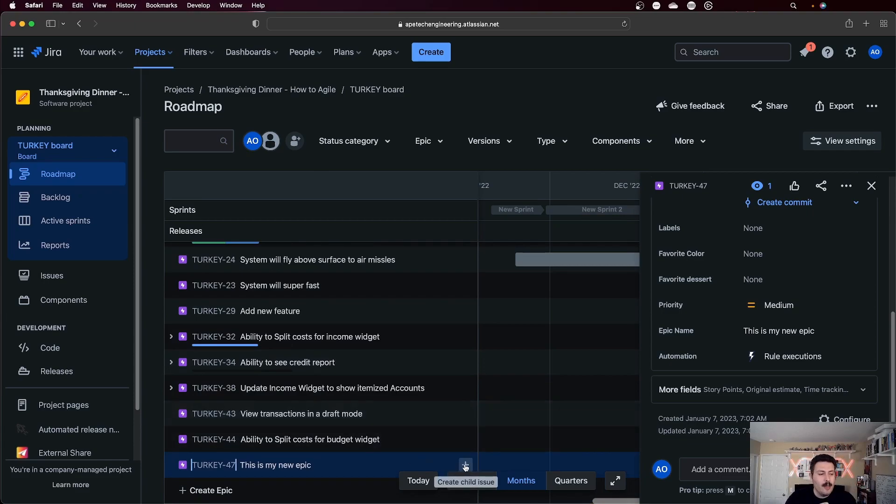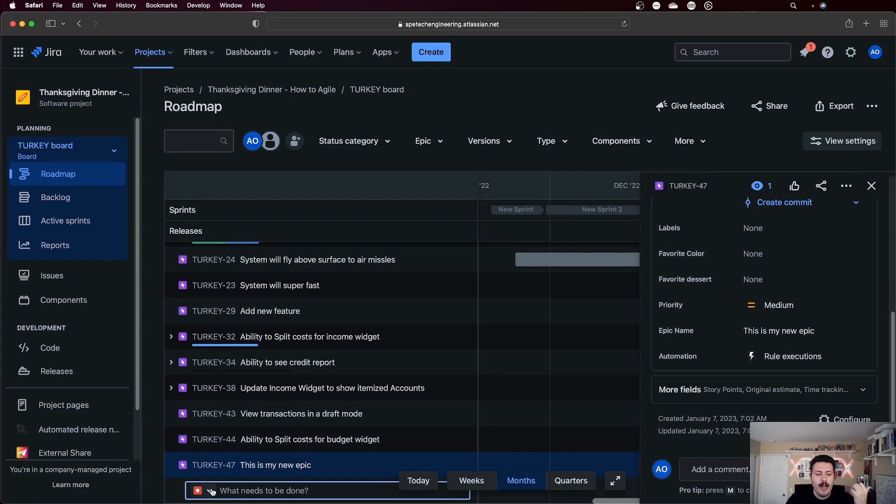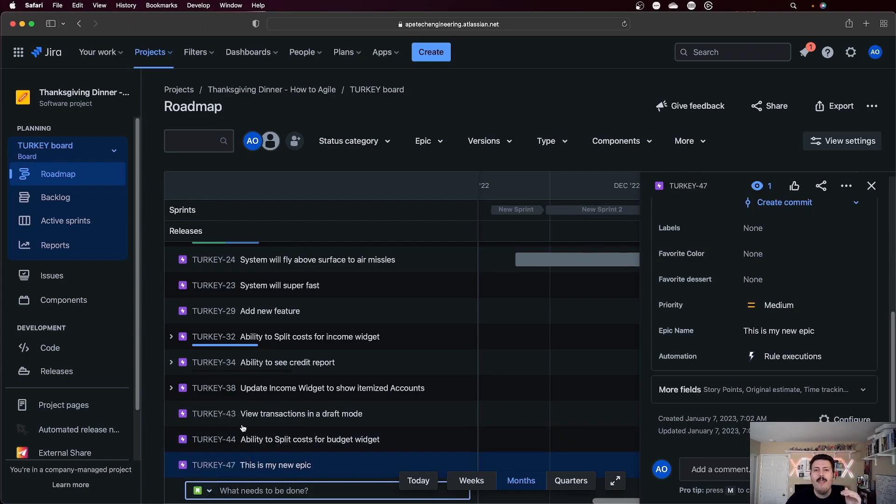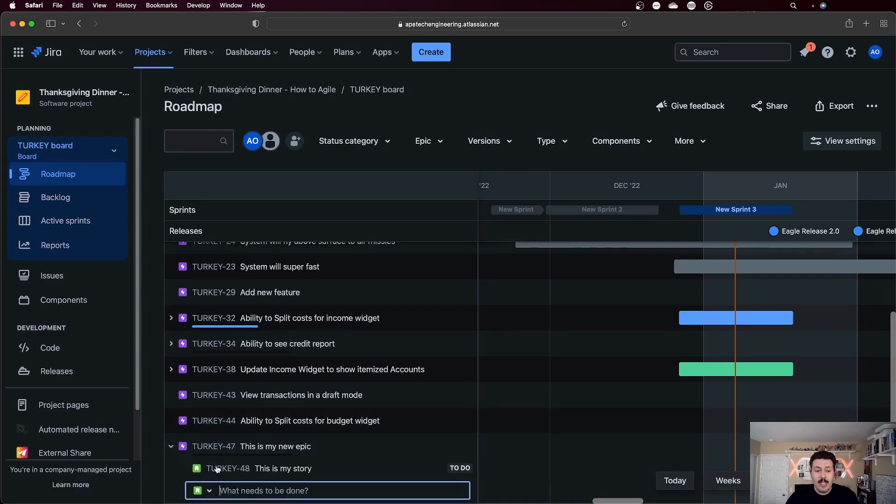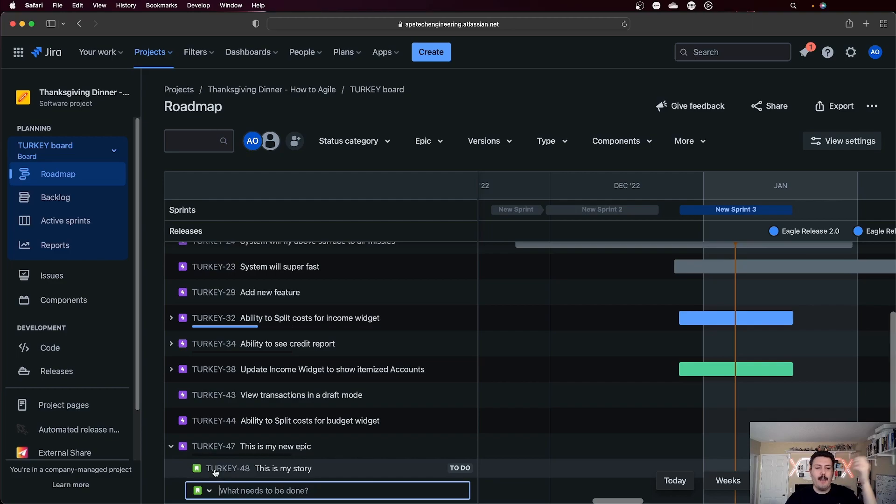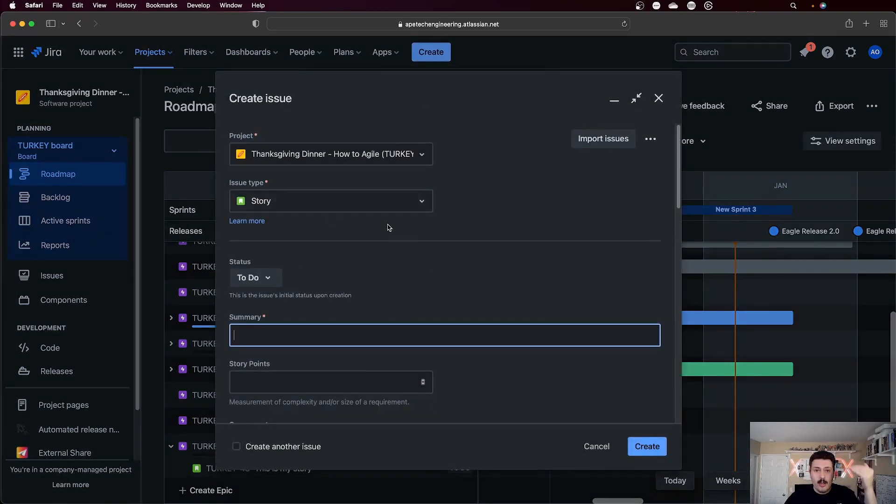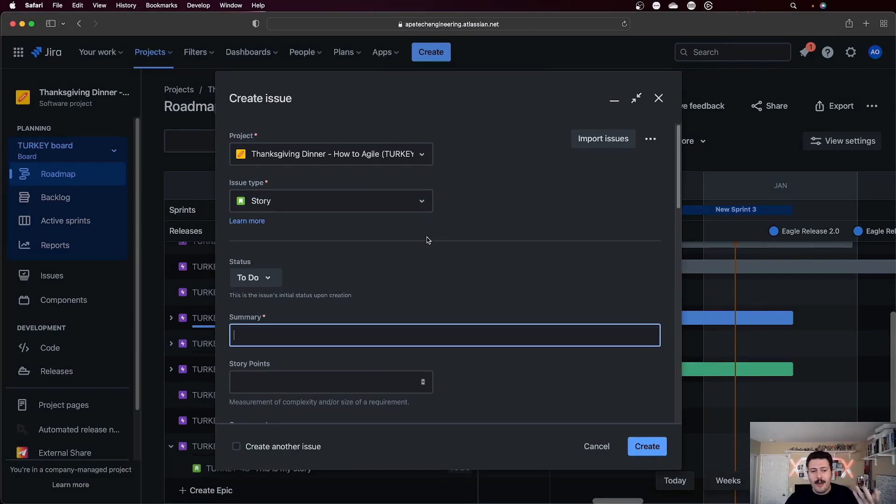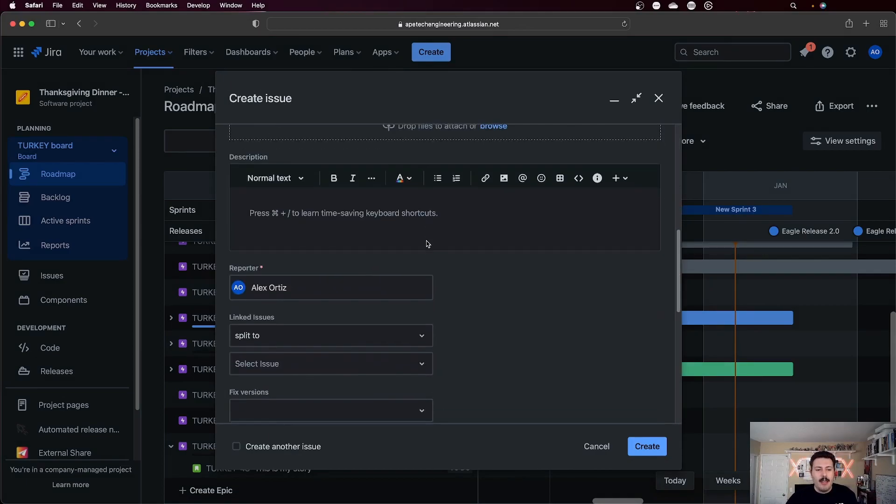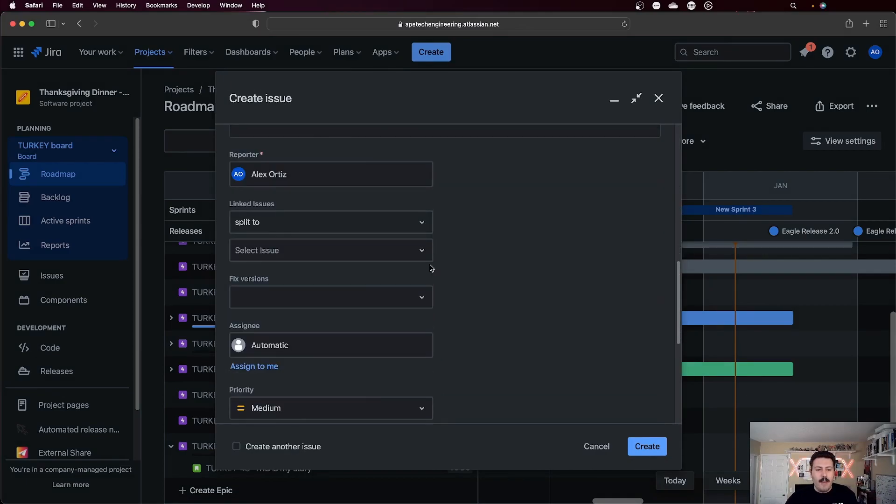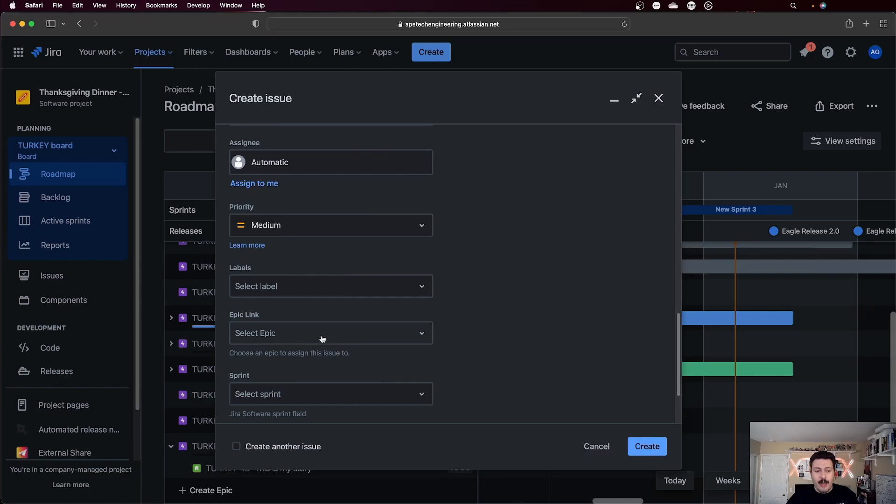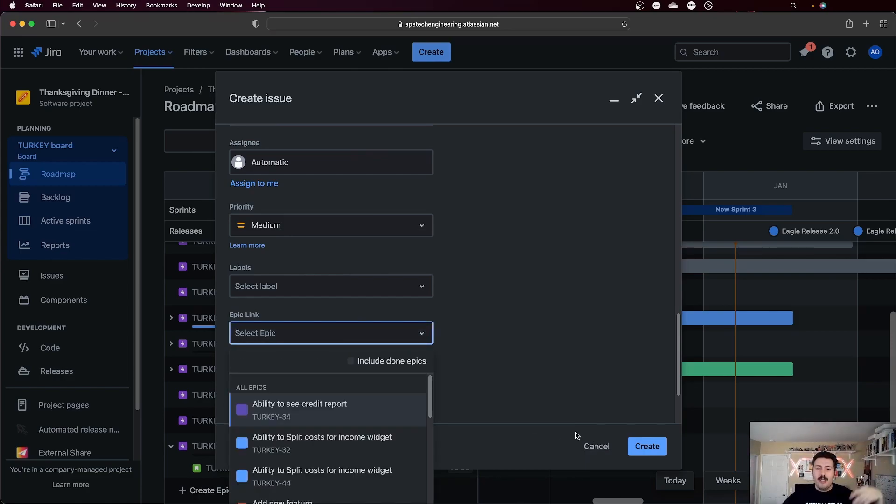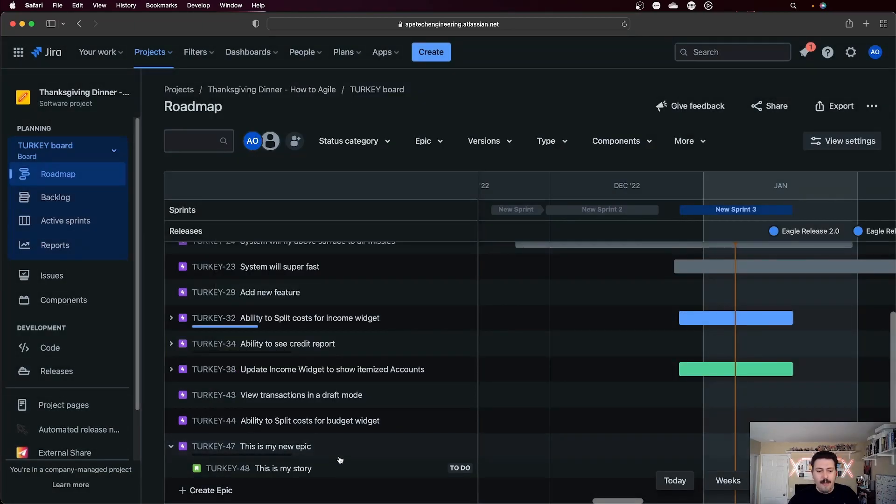The other cool little thing that you can do, if you click on this little plus sign on the epic itself, you will then be able to create either a bug, a task or a story, whatever basic issue type you have defined in your JIRA. So when you come over here and you type in, this is my story and you hit enter the relationship, the linking between the story and the epic is now created. You may remember that when you create a story using the regular create method, you actually have to come down, find your epic link field and then select your epic. It's just extra work because now you got to remember which epic does this story belong to.